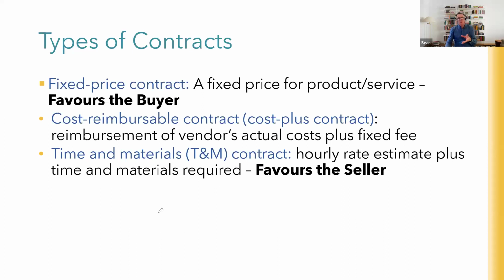So you do have a choice, and always think about what's going to get this job done best. And it's usually going to be more collaborative, open book, those sorts of things. But sometimes a fixed price does actually work too, if you're prepared to accept that the seller giving you the price has built the risk into that pricing.